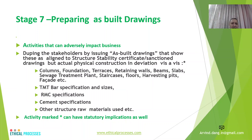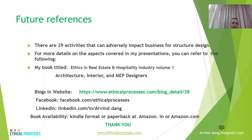Stage 7 is preparing the as-built drawings. The structure has different components — columns, foundations, retaining walls, beams, and so on — and the as-built drawings must conform to what is actually physically constructed, not what was previously sanctioned or approved. Producing as-built drawings merely to align with sanctioned plans is not appropriate and can lead to serious complications later on.